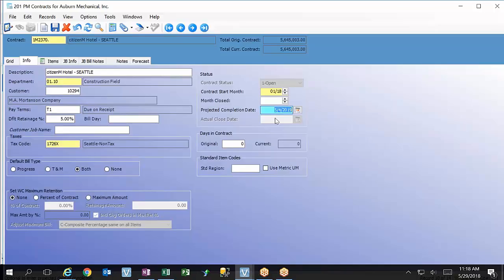Right, well, what I've been shown is, whether it was bell curve or linear, once they start manipulating, if they know they want to kind of load the schedule during maybe the summer months, it wasn't requiring 100% calculation at the bottom. You had to change every line, every month, you had to keep changing it. It wasn't doing the math for you, and you could easily make a bad error. So I'm hoping that they're going to revise that.